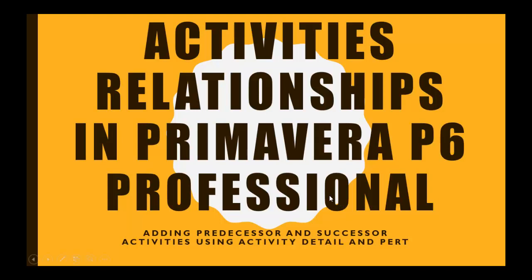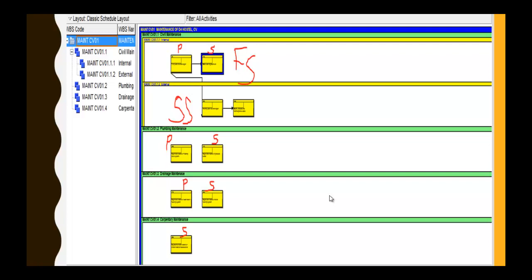There are four types of activity relationships. We have FS, Finish to Start. We have FF, Finish to Finish. We have SS, Start to Start. And lastly we have SF, Start to Finish. The FS relationship means the predecessor must finish before the successor activity can start.